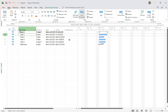The milestone is showing an early date because we haven't linked the tasks together. Let me show you really basic how to link them. This is the logical dependencies between the tasks. In a project, tasks always have a sequence — you want to sequence the tasks and tell Microsoft Project the logic and sequence of those tasks, and Microsoft Project will give you dates. That's what Microsoft Project is good for: it gives you dates, costing, and all the information you need for your project schedule.